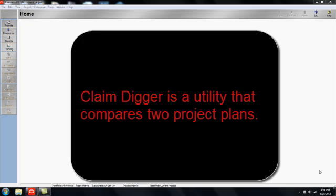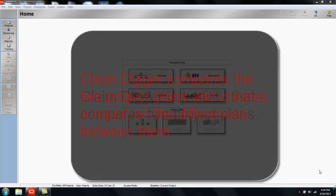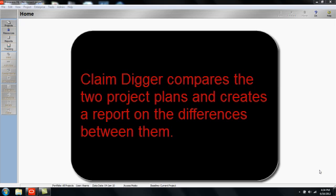Regardless, ClaimDigger compares the two project plans and then creates a report on the differences between them, including items added, items deleted, and any items that were changed.